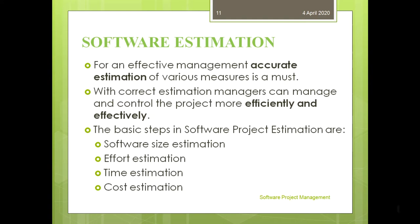There are four basic steps in software project estimation. They are: estimate the size of the development product; estimate the effort in person-months or person-hours; estimate the schedule in calendar months; and estimate the project cost in agreed currency. Let us see each and every step in detail.